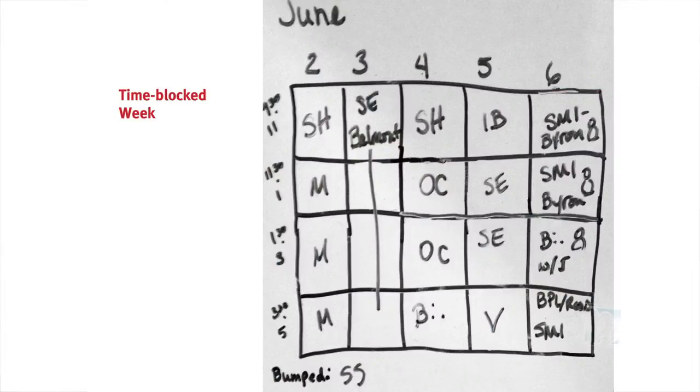The advantage of doing this is that you can start to look at larger time frames. So I know I have four blocks a day. Immediately I know how many blocks a week I have, right? So I can start to estimate as far out as I know I can estimate 1.5 hour chunks. So I can break down a project and say, you know what, this project is going to take 60 hours. All right, so I'll break it down even further into the subtasks as necessary, but I can schedule that out because I know how long it's going to take and I know how much time I have.